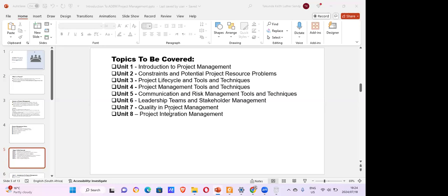All right, it's 2 million rand. And then things happen as you are executing your project, and your organization maybe cuts that budget from 2 million to 1 million. What does that mean? It means that the scope of work, the work that you would have planned for with that budget, is going to be affected, because now you have less money, but you've got a lot of things.